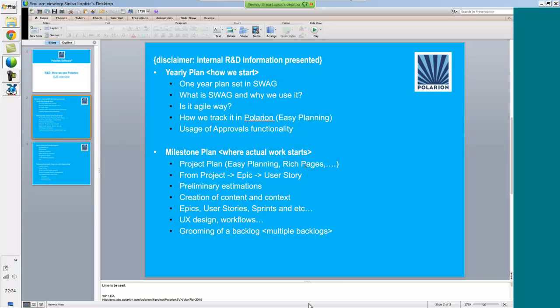So for instance, for me in this specific project, even if it's only 6% off, it actually gives me higher risk because there are only around 20 plus user stories verified and completed, with around 120 outstanding. So we use this type of information to really understand the health of the project and how to actually manage it.